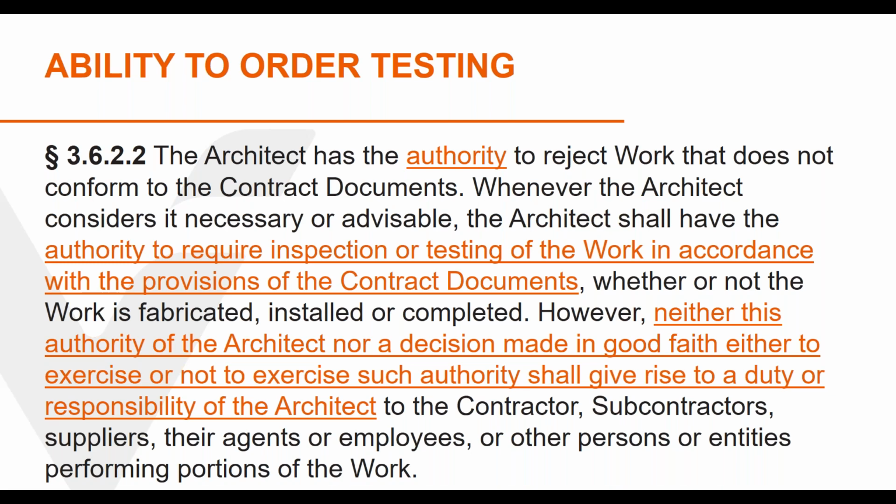The language on good faith was added in 2007 to further protect the architect. It means that the contractor and others cannot later state detrimental reliance on the architect's action and therefore bring a lawsuit against the architect when the architect took action to either test or not test.